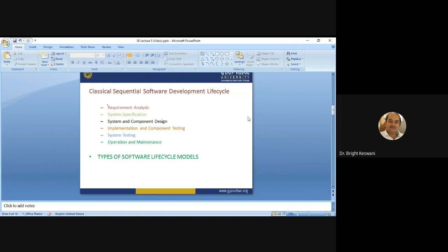These steps are the main phases, and there are also sub stages within each stage, but they differ from project to project. For example, for management purposes, the requirements stage is divided into a feasibility study, an outline requirement definition, a system study, and a requirement specification stage. And it is also possible that certain software projects require the adding of an extra stage altogether, or the splitting of one into two stages. Okay, so these are various stages of SDLC.